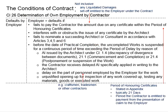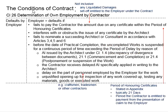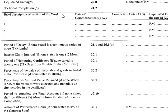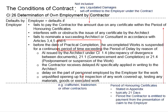The next case of employer default is when, before the date of practical completion, the uncompleted work is suspended for a continuous period that has exceeded the period of delay. This period is specified in the appendix of the contract and is typically taken as 3 months. Before practical completion, that means the work has not been completed, and the work has been suspended for a period exceeding these 3 months.